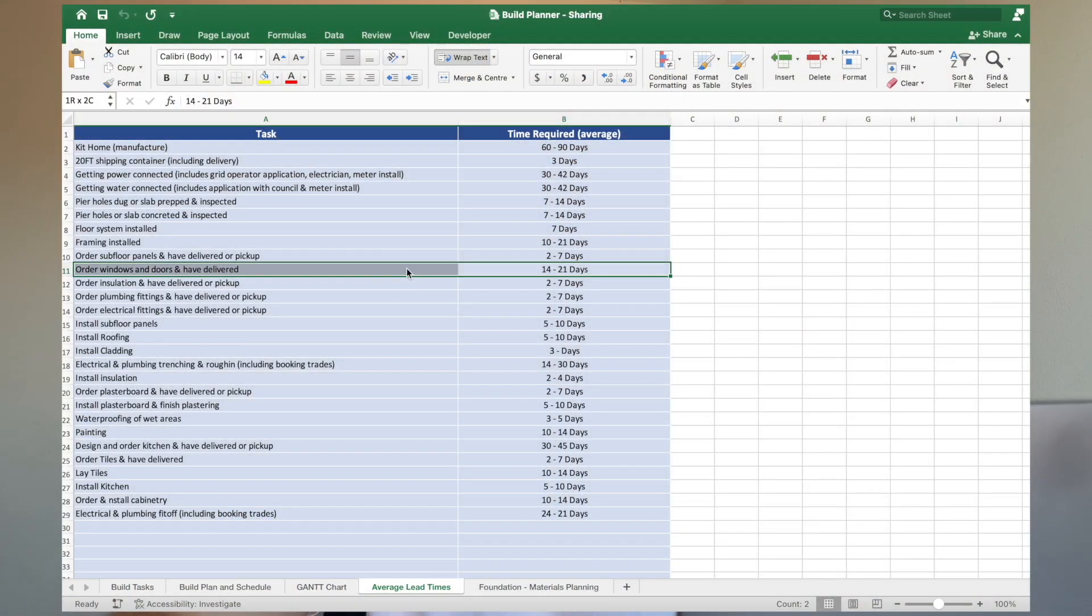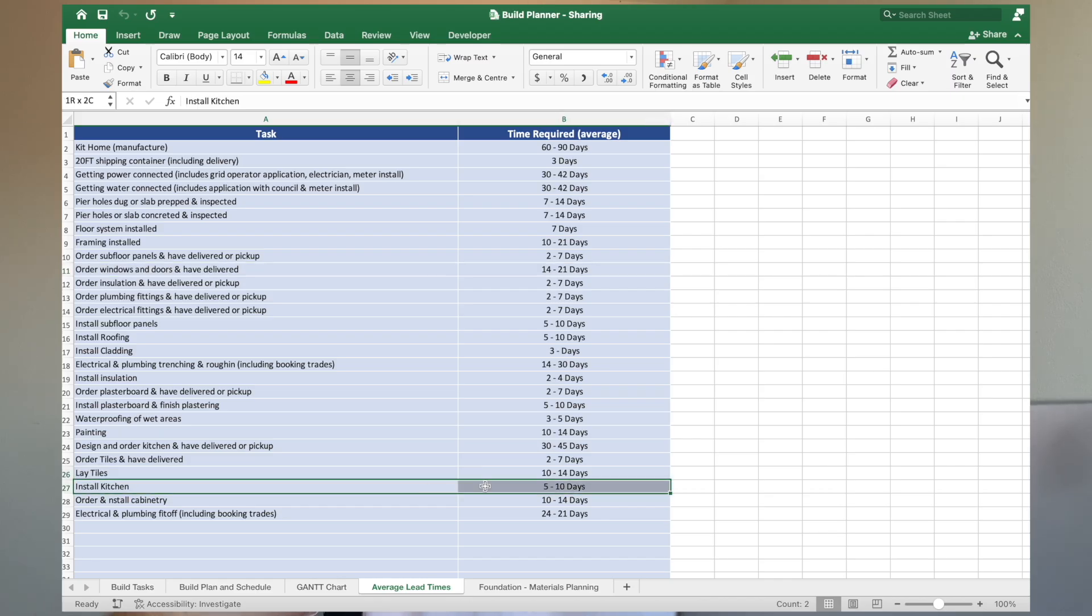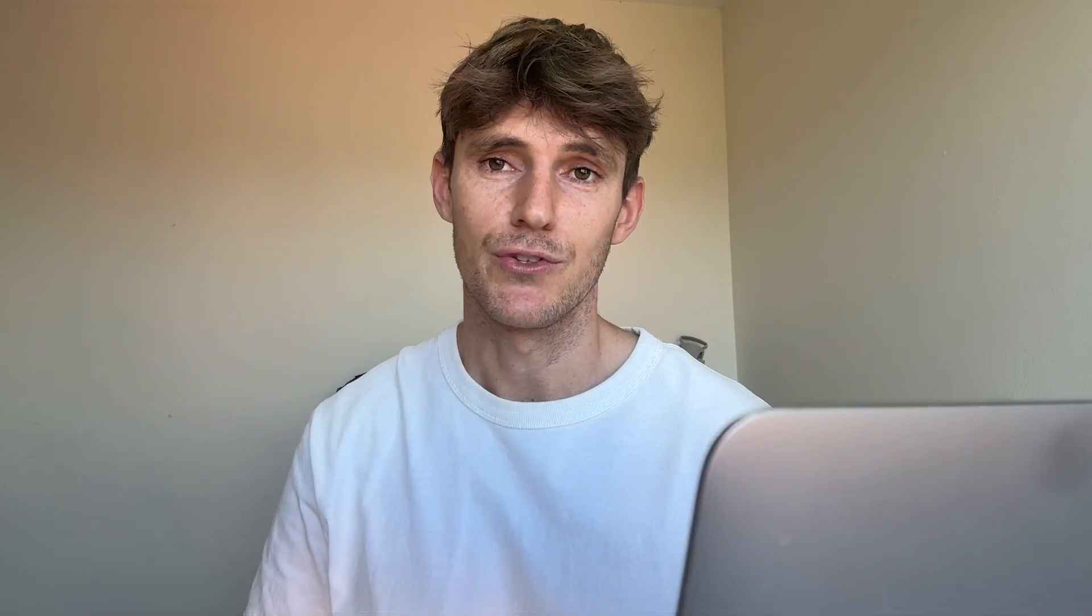This is all tailored to my build at the moment, but what you can do is I've put the average time frames for different activities relating to the build - whether that be ordering windows and doors, what's the average lead time from main suppliers, or how long it takes to put a kitchen in DIY. You can download this for your build, clear the task list, and start putting your own task lists in.